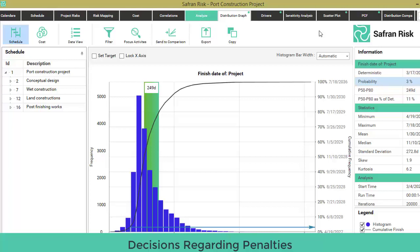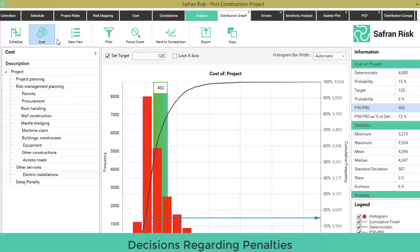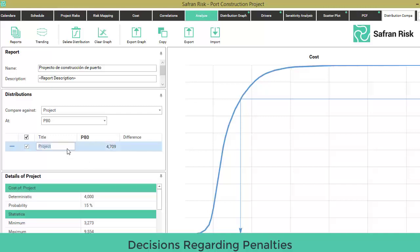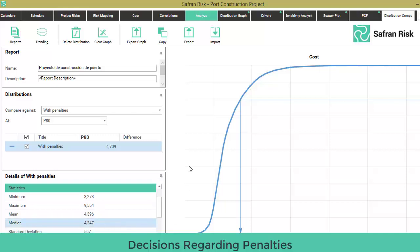There are at least two ways to answer that question. First approach: on the cost distribution graph, select the histogram for the total project and send to comparison. Make sure there's no previous curves being sent. Change the name for this compared curve to 'with penalties'. On the details of this scenario, you can observe, for example, that there's only a 15% probability of a total project cost of under $4 billion, with a median of $4.24 billion.